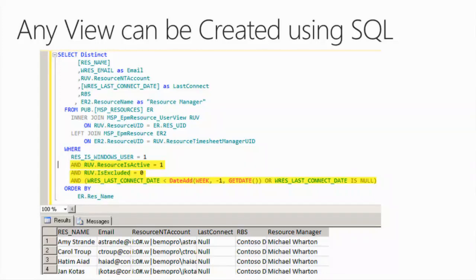In fact, I've created a field, is excluded. I put this special field in the resource profile called is excluded. For those people that I don't really need to be telling them to enter the time, I'll just exclude them from that list. There's other flags I might put in there, but that's one of the most common ones that I've been using. I used to build that query each week and write this person's email address, exclude this email address, etc. Now that just resolves that.